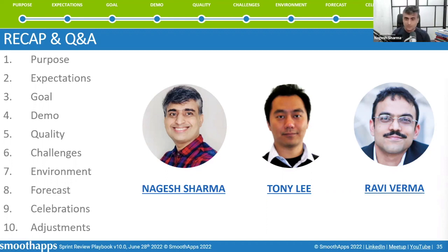And then we would see what is our 15% solution. That means definitely one or two things which are must-dos for us, which don't require a lot of negotiation or influence from other stakeholders in order to order the product backlog. So those are certain techniques which I would design together, and I have done it in the past, which has really helped us identify what's valuable versus what's less valuable. I would not say not valuable, because everything coming from the stakeholders is valuable.